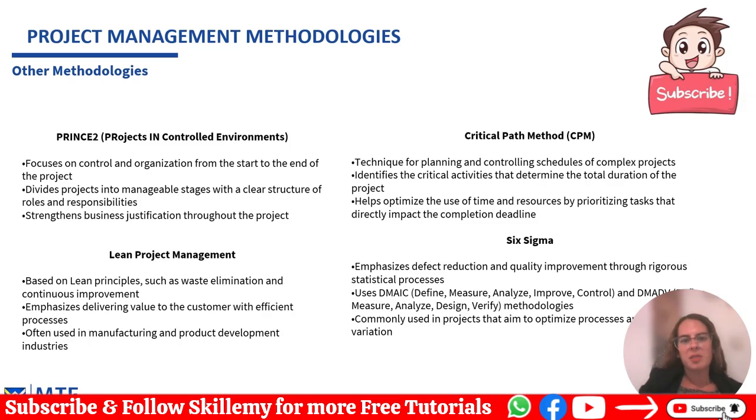An important principle of PRINCE2 is business justification. This means that the project must have a strong and ongoing justification for its existence, not just at the start. If the business case no longer supports the project's goals, it's recommended to either modify or stop the project. This focus on value ensures that projects are aligned with organizational goals and resources are used efficiently.